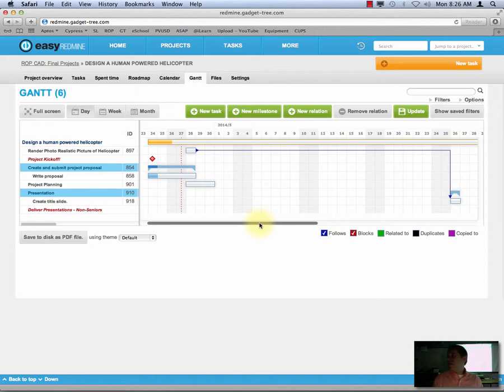Okay, any questions at all on this project planning? So you're just going to go through your project. Again, just break it up. I like to begin by listing all of my deliverables first, and then I'll take each deliverable, most likely in order, go through, brainstorm all the tasks that will be involved in those, and start filling in all the relevant information for each task. Good luck.